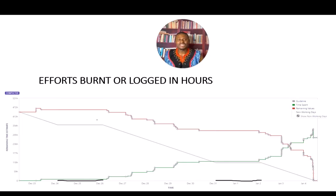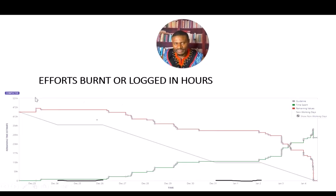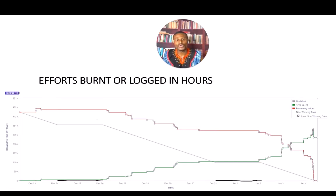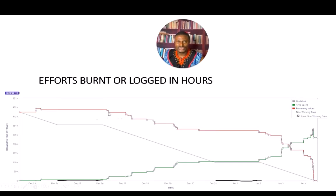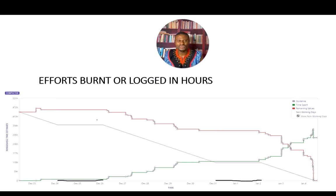So that's what a burn down chart shows us. Whenever you see a spike up, it may mean the team picked up new stories — that's scope creep. If it burns down in story points, it means the team completed some stories, or possibly removed work from the sprint, which is not typical for scrum teams.